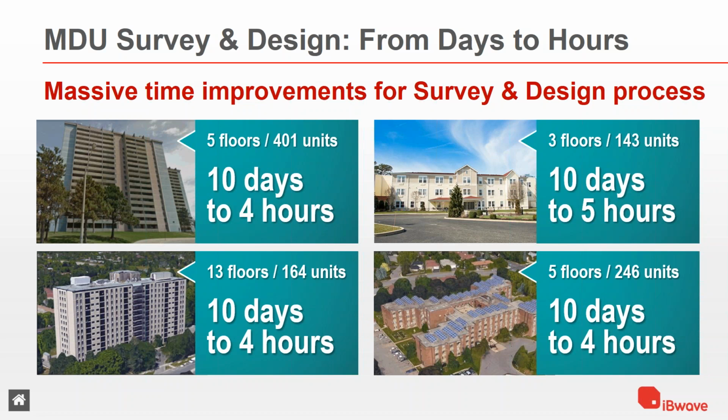this is a solution that we've been working with for the last few years with carriers worldwide, and we're able to see massive time improvements with their actual deployment processes, going from a number of weeks down to a matter of hours. And through the process that Dave mentioned a little bit earlier, in many cases the issue was due to idle times. So we saw all these challenges on site, we saw these design challenges, but at the end of the day, there are always approvals required in between these phases.